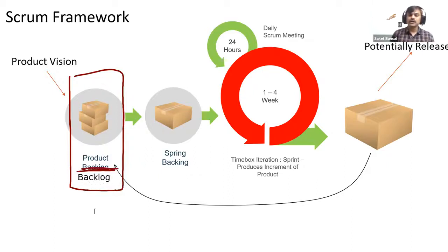Now, product backlog helps me keep accumulating new ideas. In PMI language, it's a living artifact, which means it never gets baselined. If I use project management language, this is a scope document which never gets baselined, or a requirement document which never gets signed off. It keeps emerging. It keeps changing all the time. Now, somebody may wonder, but how do we work on such a document?